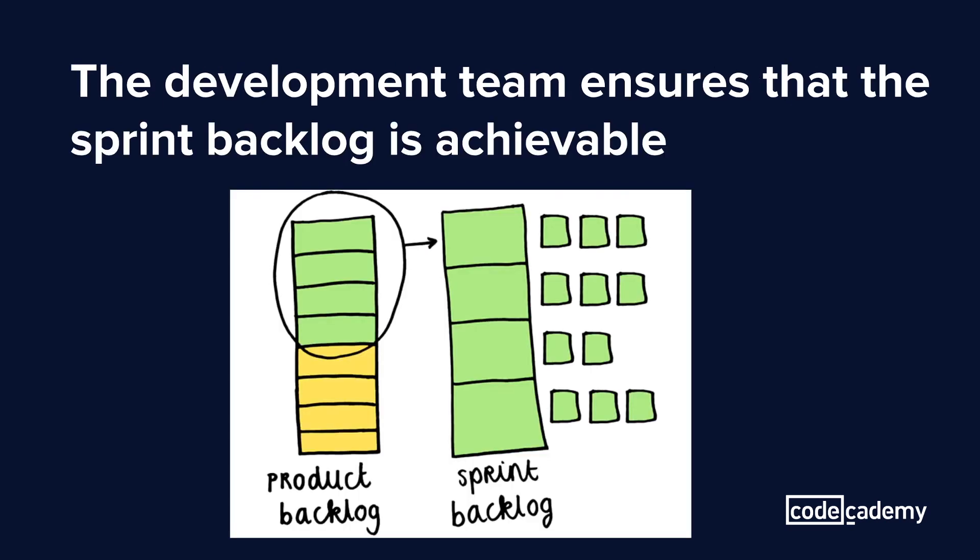The product owner determines the priority of the business needs and maintains this product backlog, which contains all the requests that aim to deliver value to clients. The product owner will move tasks from the product backlog into the sprint backlog, which is a list of tasks that the team is committed to completing in the duration of the sprint. Meanwhile, the developers will bring the technical perspective and make sure that the sprint goals can be completed.